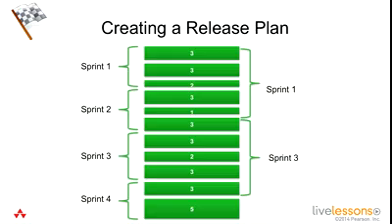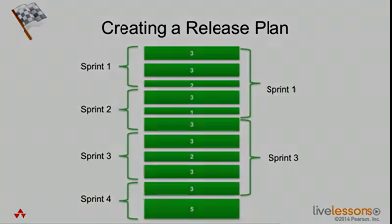If you really have to get something in, you want to make sure that you plan that using the worst case scenario and get it under the line with that average to be fairly sure that it's going to get in there. But then you can look at the future and say, if we were operating at all 4 cylinders, this is where we'll be.